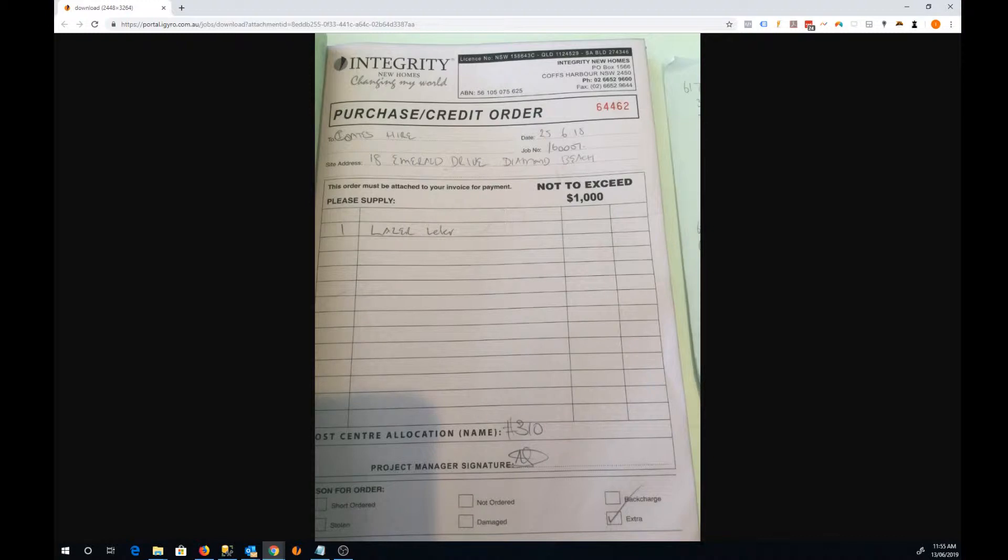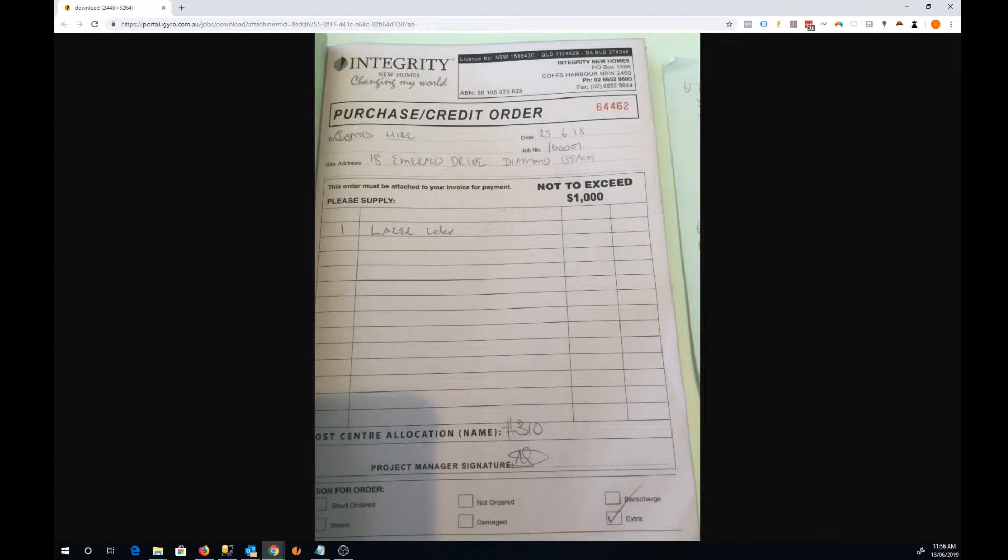The problem with this is the length of time it takes to get this purchase order back to the back office staff so they can use it in the accounting. A lot of times it's either dropped back into the office in person and someone has to photocopy it and re-key in all the data.